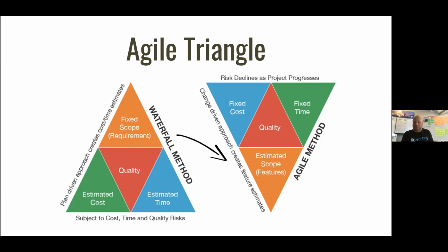I'm only going to cover Scrum today, not Kanban, but I have another talk on Kanban that explains why we need bigger teams, because we need more T-shaped people. But the point is that as soon as we fix the team, meaning we're trying not to loan resources, or I hate the word resources, people, from team to team, once we fix the size of the team, we've now fixed the cost, because the cost is the salaries of that team.